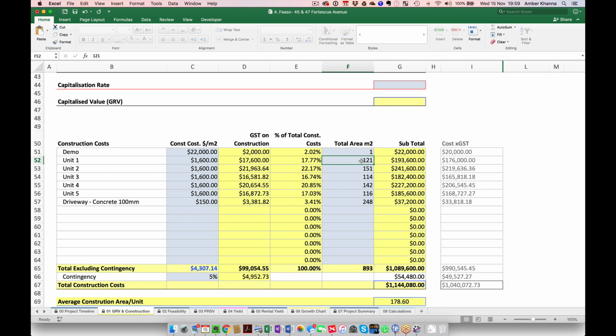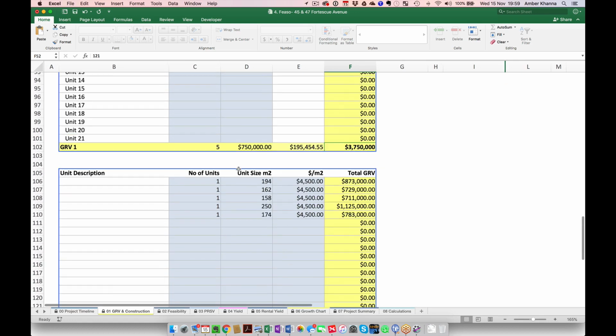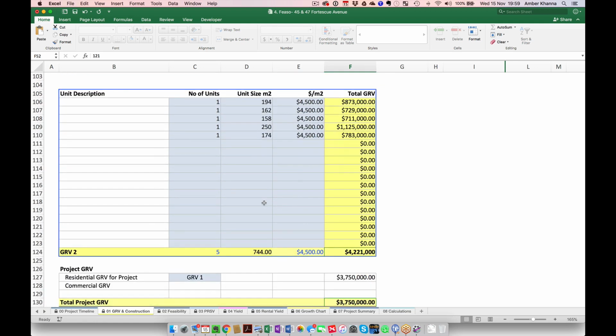This should actually just make sure that this total includes your ground floor, your first floor, and your garage. So if it includes these three things, don't include the private open space, and don't include the balcony if there is a balcony there. It's including everything but the open spaces like your backyard, your balcony; it's just internal space and the garage. So this is like construction area pretty much. Yeah. So what I would want to do is say, look, on this side, if you go this way, your average sale is.